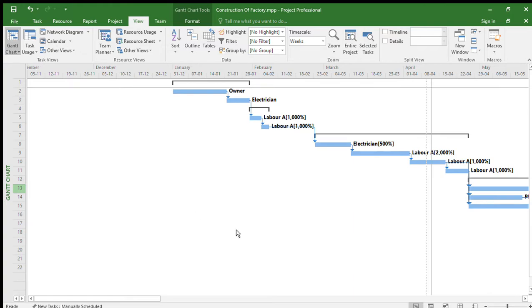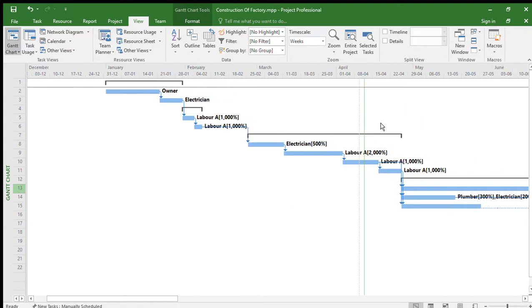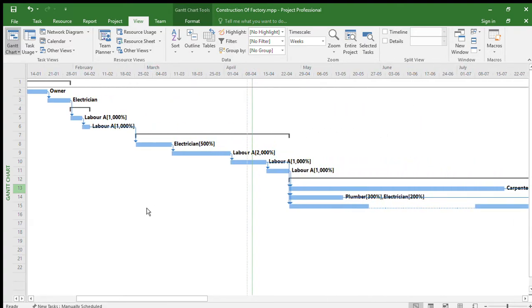This is a Gantt chart. In a Gantt chart, there are three main relationships between sequential tasks. One is finish to start. That is, a task cannot start before a previous or related task is finished. However, they can start later.